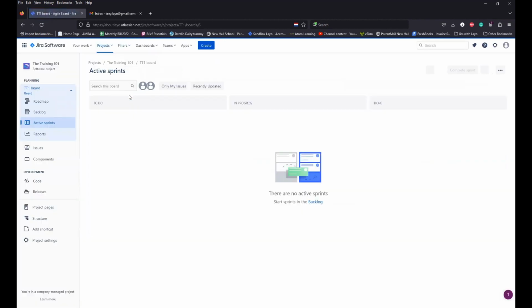Right now, by default, every single project you create gets a board created, if at the point of creating your project you've specified that you want a Kanban or a Scrum. If you specified a Scrum, it would create a Scrum board for you. If you specified a Kanban, you will get the Kanban already created by default. The filter used by default is just going to be focusing on everything in the project you're creating.